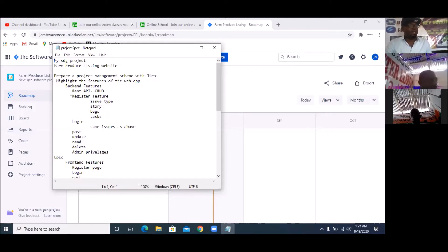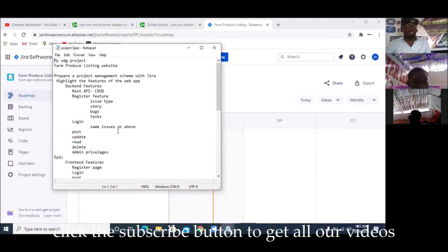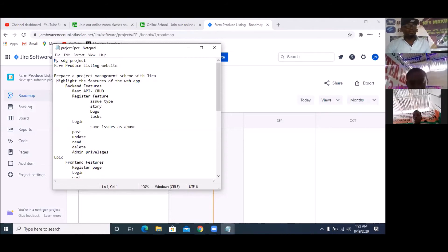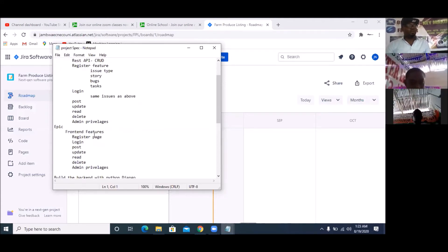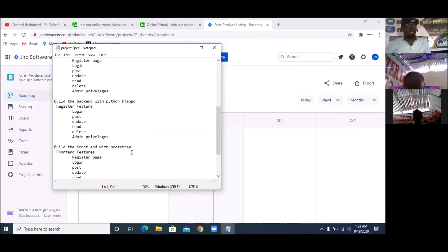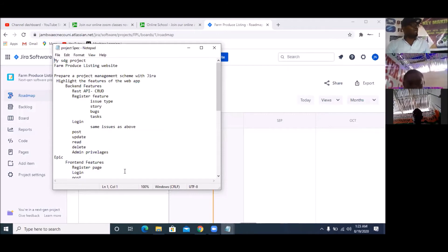What do I need to do? I want to: prepare a project management scheme using JIRA, highlight the features of the web app, design the backend, design a REST API with CRUD operations — registering, login, post, update, read, delete — and manage admin privileges from the backend. Under each of these, you can have issue types like Story, Bug, or Task. These four major things — backend, frontend, hosting, and project management — are my major milestones, known as epics.